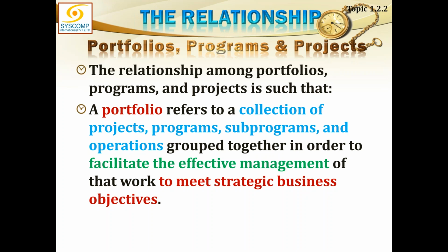right? What is the purpose of portfolio? Purpose of portfolio is to ensure that the right projects and programs are being done, not are they being rightly done or not. So it prioritizes the most important projects and programs for the organization and allows them to be chartered.